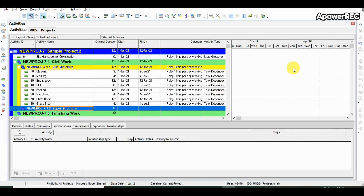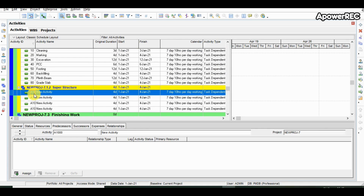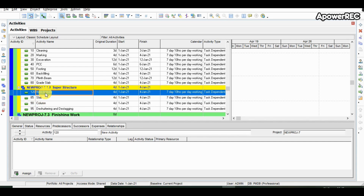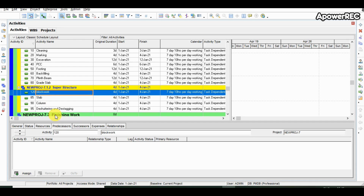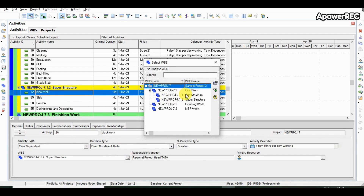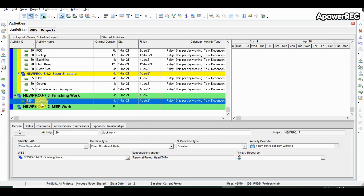Now moving to superstructure. Suppose there are 5 activities — we click the add symbol 5 times. We then change the activity code, name, and duration for each activity. There is a question: whether the WBS can be changed later on. For example, if we want block work under the finishing WBS, we select the block work activity, go to the general tab of activity detail, and change the WBS. Yes, in Primavera it is possible to change the WBS at a later stage. We have changed block work from superstructure to finishing work.